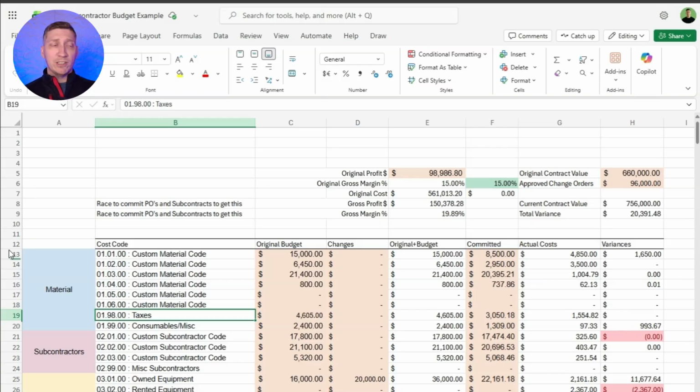It cost more. It cost about $30,000 more than the rock budget would have, but it was significantly less than everything else we were going to sacrifice. And it was actually faster. So with all the other efficiencies, we made a guaranteed loss of $30,000 for a much bigger profit on the other end. We actually made 3% more gross profit than we would have had we not done that. We would have lost 10, 15% overall because it was such a big mistake.